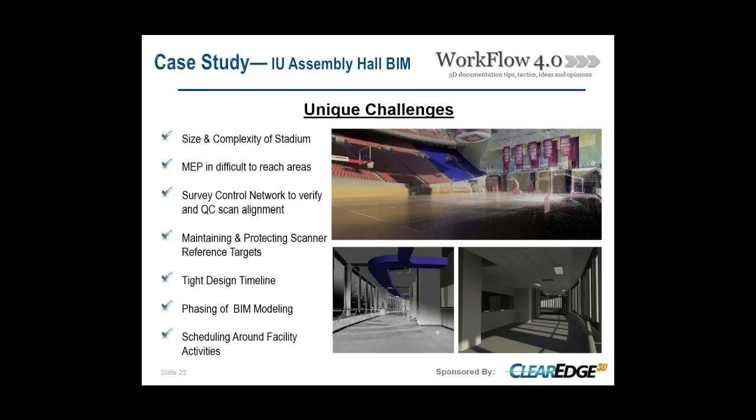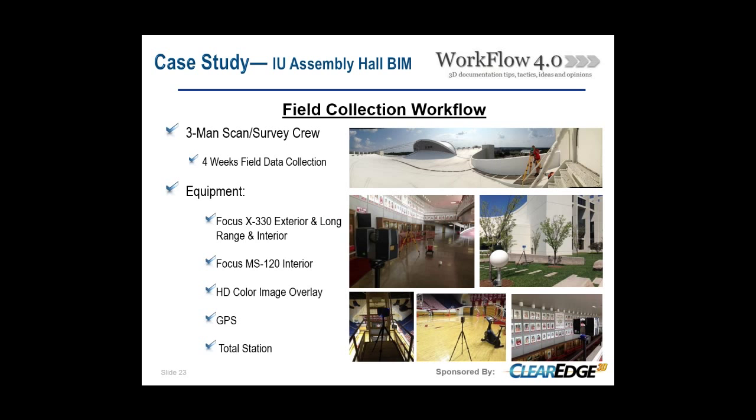And then lastly, we did this in the spring. College was still in session, so there's a lot of activities going on in a building like this, including graduation. We were dealing with summer basketball youth camps, so scheduling around the facility activities was pretty important for this one. And if we didn't do that carefully or work closely with the facilities department, we would have lost some critical field data collection time meeting our clients' timeline.